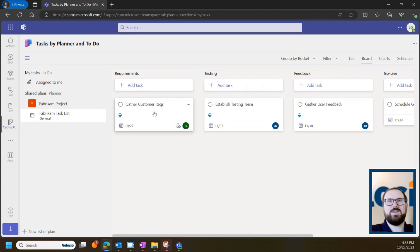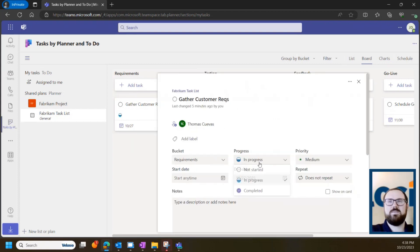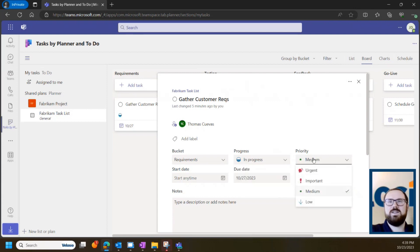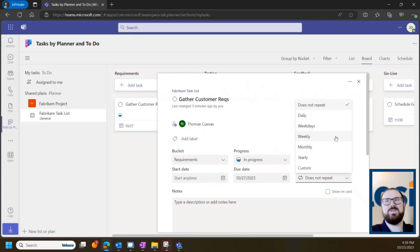For example, under this requirements tab here for gathering customer requirements, I can assign it to one of my colleagues, choose the bucket, give it a progress status, even a priority, a start date, due date, set whether it repeats or not, which is especially useful for recurring meetings.